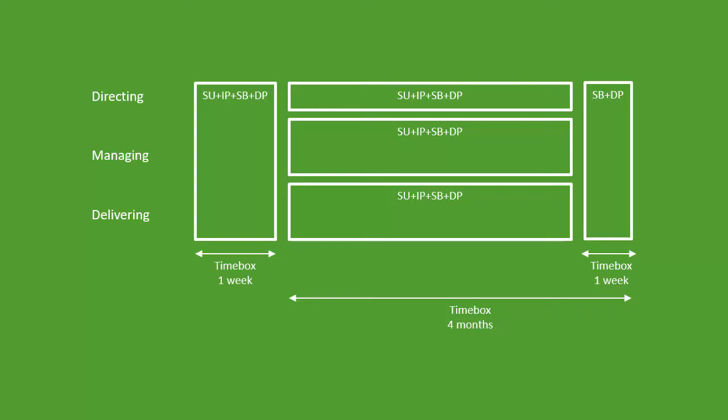When you're getting near the end of your delivery stage, you want to plan for the next stage, and you also want to summarize what did we actually get done in this stage. And that's where you use managing stage boundary. And because we want to do collaboration and rich communication and all that, think of managing stage boundary and directing a project put together in one box, covering all the way from the product board level, product manager, and the teams. So they're going to do this just like they did with the initiation stage. They're going to do it together.